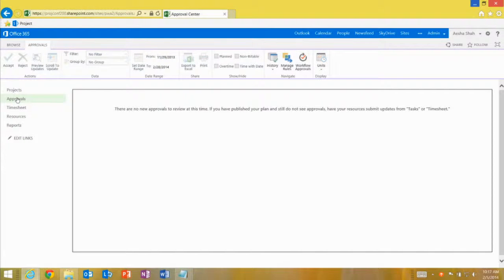So if you're doing timesheeting for billing and invoicing, it's hard to track where the timesheet approvals are. For timesheets specifically, they need to be approved before it's official in any way. So if you're using timesheets for billing purposes, it's not going to bubble through until the timesheet has been approved.